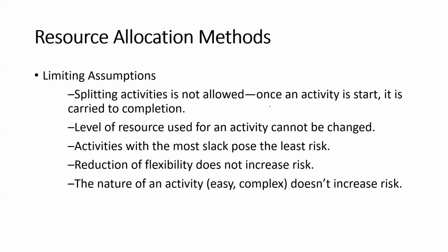We cannot partially complete that activity, stop, and go to another activity. Splitting activities is not allowed. That is one of the assumptions we have when allocating resources.